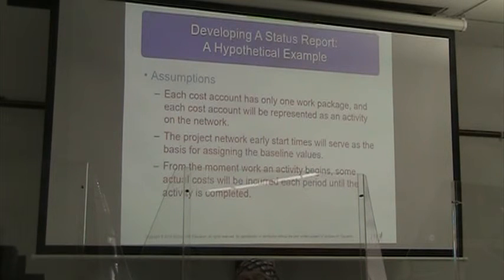Our project network early start times will serve as the basis for assigning the baseline values. And from the moment work on an activity begins, some actual costs will be incurred each period until the activity is completed. So there you go.